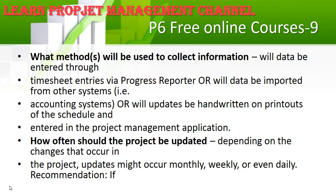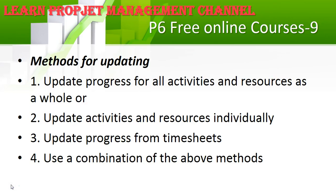How often you update the schedule — daily, weekly, or monthly — depends on the importance of your project. Some turnaround projects in oil and gas update hourly, because every hour of delay can be a significant cost. Your update frequency and methods — whether updating all activities and resources as a whole, individually, from time sheets, or a combination — should be based on the contract conditions and agreement with the project manager and client.